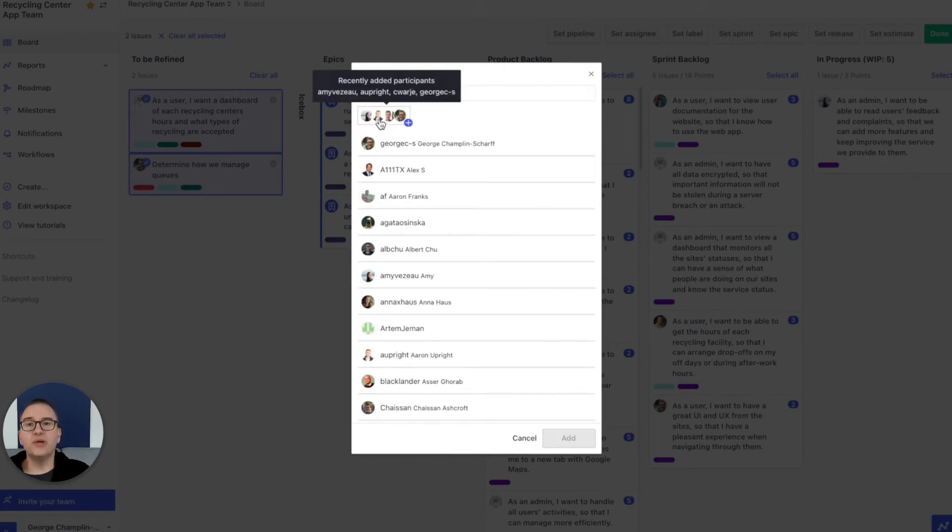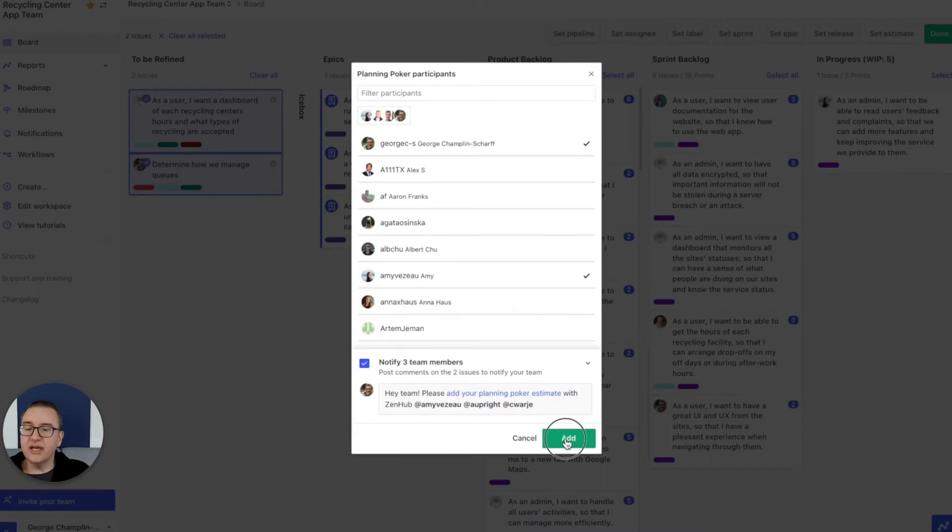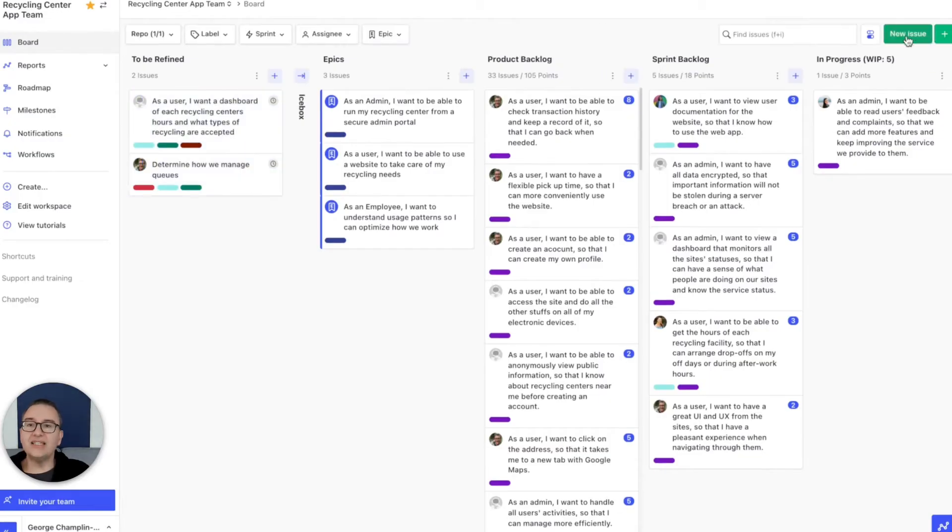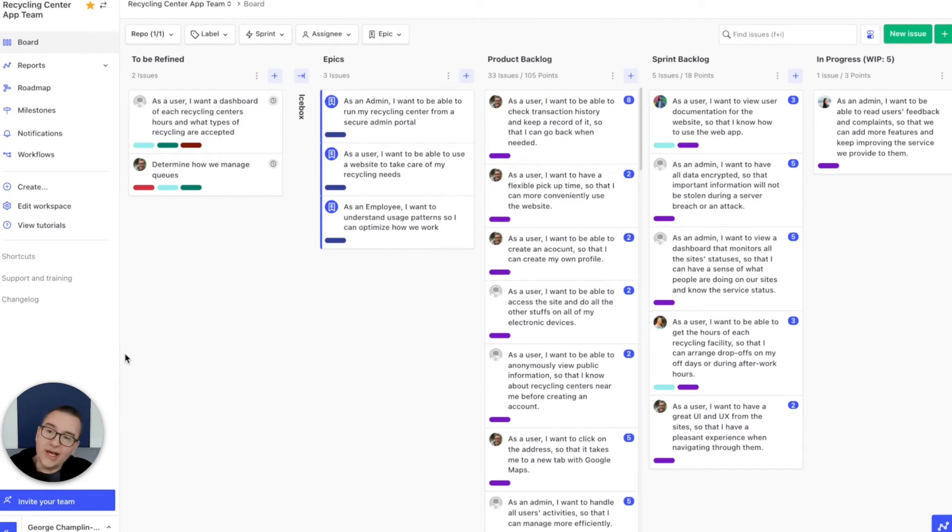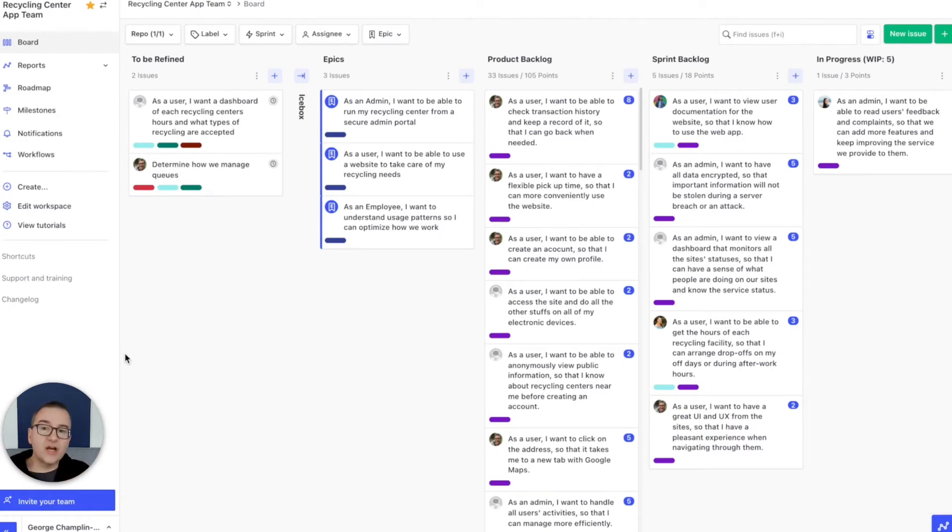And then people will automatically get notified and then asynchronously they can put in a vote. If the team agrees, the estimate is applied. If the team doesn't agree, then you can come together and align on those things that you're out of alignment on. We've talked with teams that this has saved hours and hours every single week. Imagine what you could do with that time back.